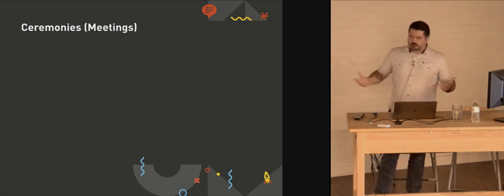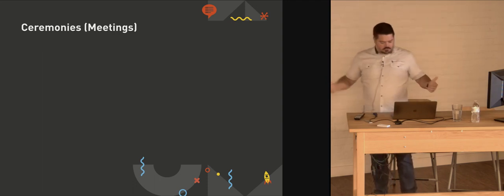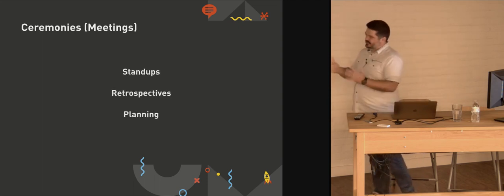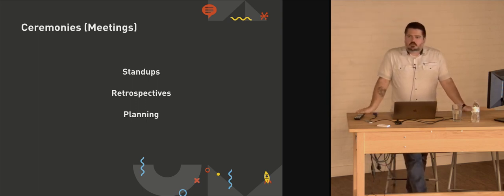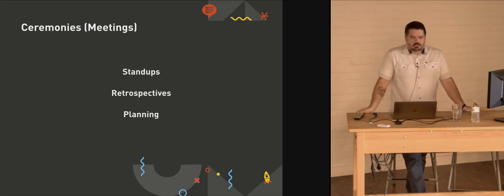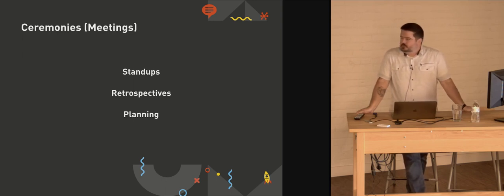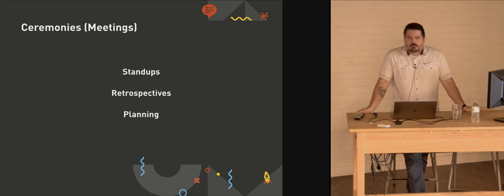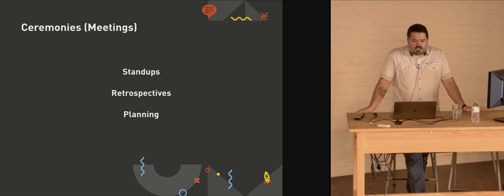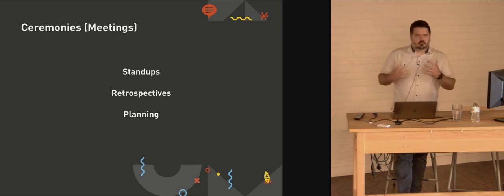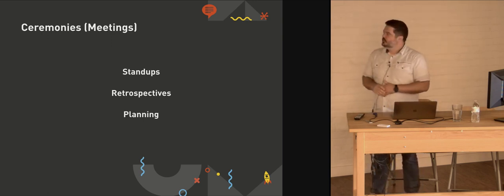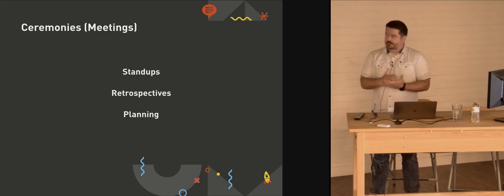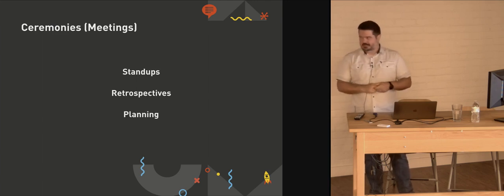There's also in an Agile environment, there's usually some sort of ceremonies or meetings, in other words. Stand-ups, retrospectives, and planning just in general. Stand-ups are important to, and I would probably say daily is probably the important part. They're there to assist the day-to-day movement of work through your process, identifying things that may be hindering you, incorporating feedback that was learned recently, and just kind of keeping things flowing through the system. And stand-up is important for that sort of high bandwidth in-person or verbal communication to make sure everybody's on the same page about what is happening today. And really, if you do a daily stand-up, you can limit it to today, which is key to keeping stand-ups short and that kind of thing.